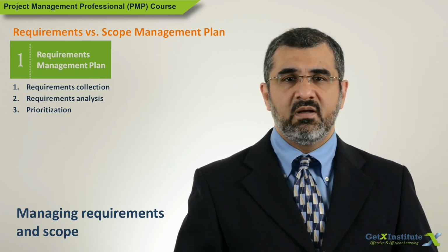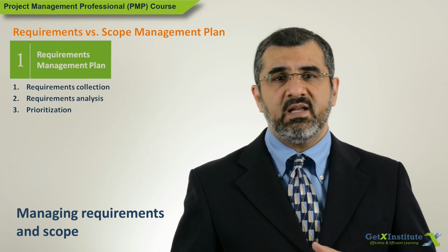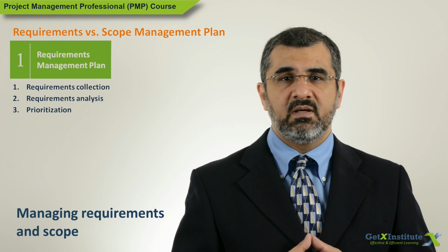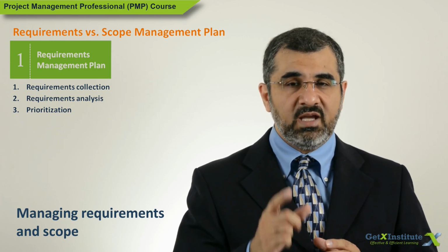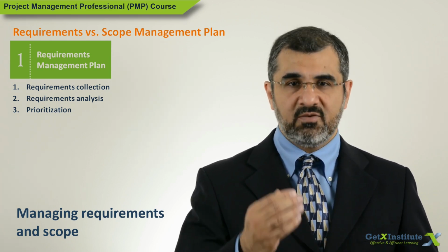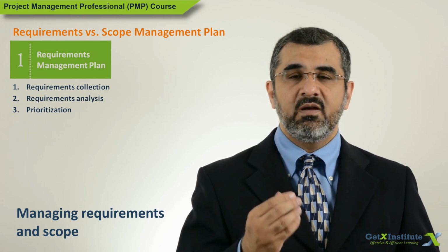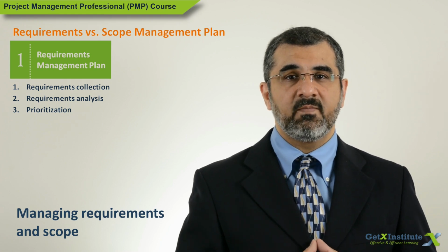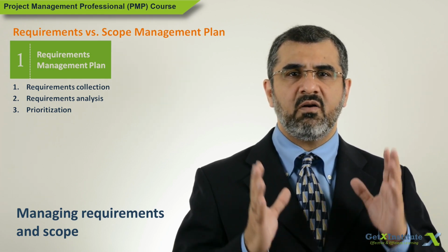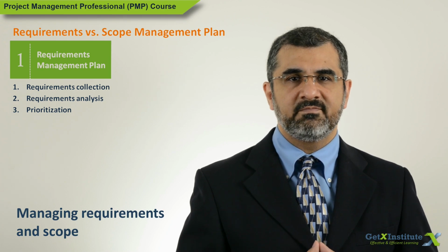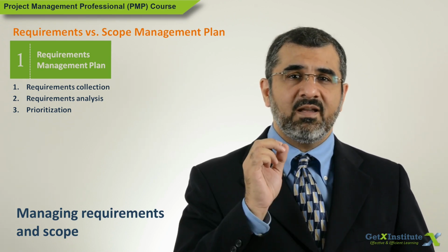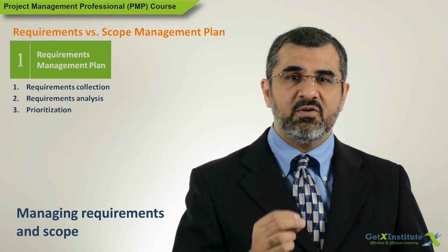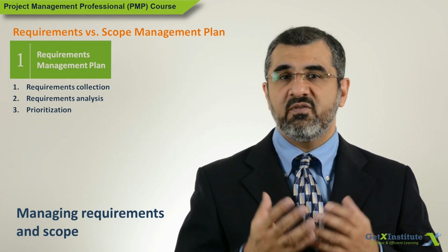For example, requirements can be prioritized as high, medium, and low priority. The project team should be careful when sending over the list to the stakeholders, asking them to prioritize. They may be surprised by the response: all requirements are of high priority. So the point is that this should be a collaborative effort. The plan should list methods that will be used for prioritization.